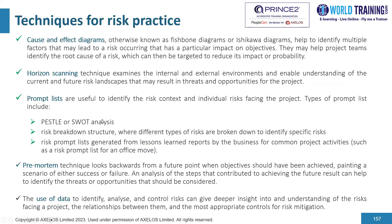There is the cause and effect diagram, also known as the fishbone diagram or the Ishikawa diagram. It is used to identify multiple factors that may lead to a risk occurring that has a particular impact on objectives. This may help project teams identify the root cause of a risk, which can then be targeted to reduce its impact or probability.